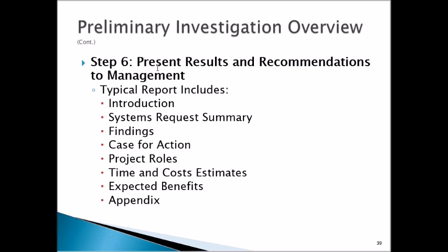Step 6, present the results and recommendations to management. So your typical report needs to be well laid out. It needs to include an introduction, the request summary. You need to list your findings. You need to present a case for action. You need to establish the roles and who's going to be doing what in the project. You need to do time and cost estimates, so you need to have that information ready as to what it's going to cost and how much time it is going to take, and what the affected benefits are, and lastly the appendix.